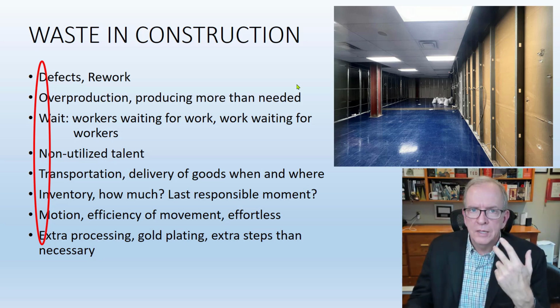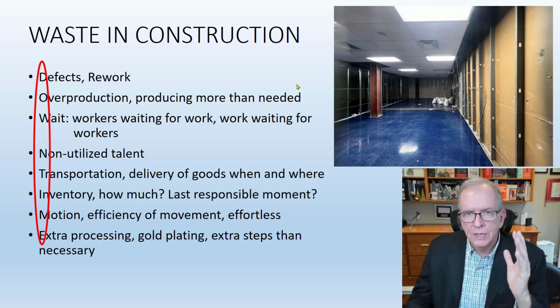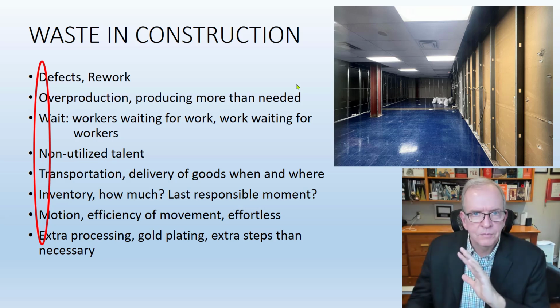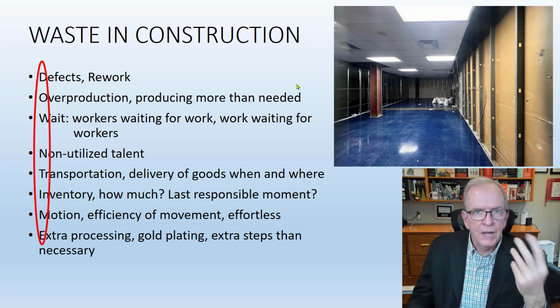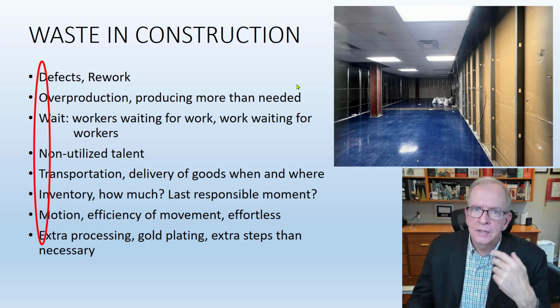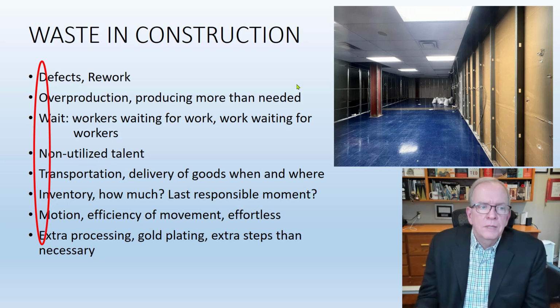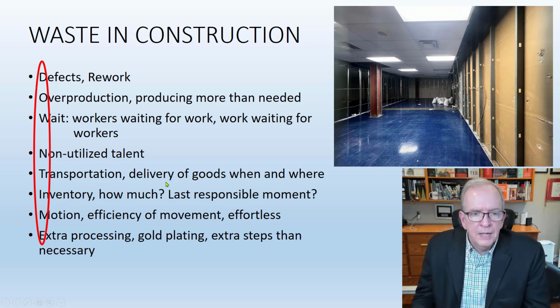So there's a lot there from that perspective. Unless it's looking like you're able to put it somewhere and it just makes perfect sense, this $15,000, if you're starting to rent sea cans for this in several months and storing it in it, that $15,000, with basically dropping it off and moving it again, it doesn't take long before you've spent that. So even though it looks pretty good, that may not be so good from that perspective.